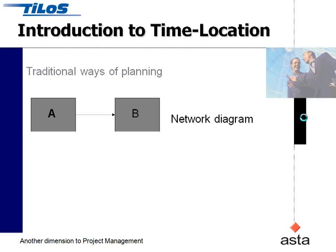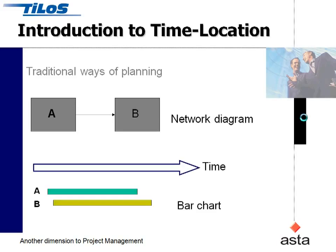With traditional planning, you make a network diagram and say that there are two activities that follow each other. But there's no information about time or any distance component. And that's traditionally been converted into a Gantt chart or a bar chart where you see the items against a common timeline.